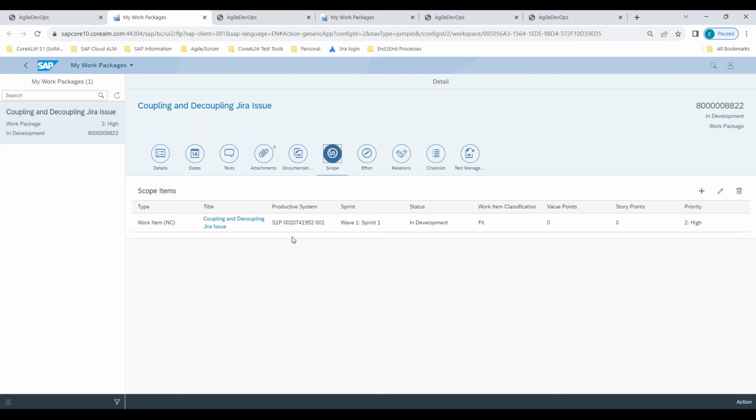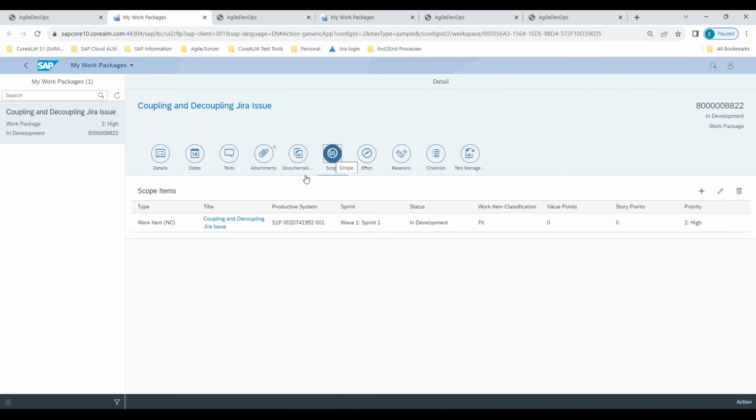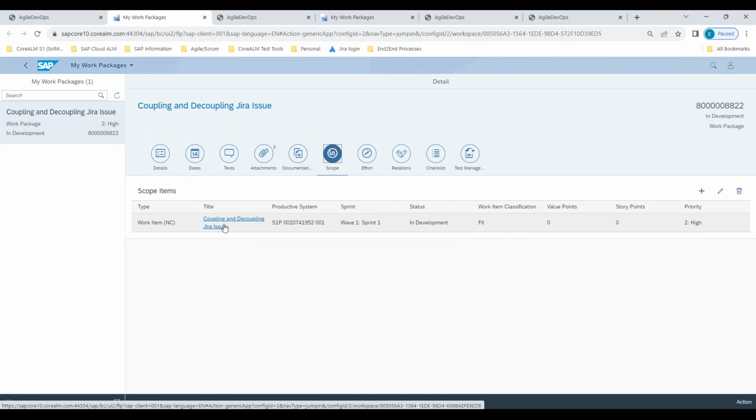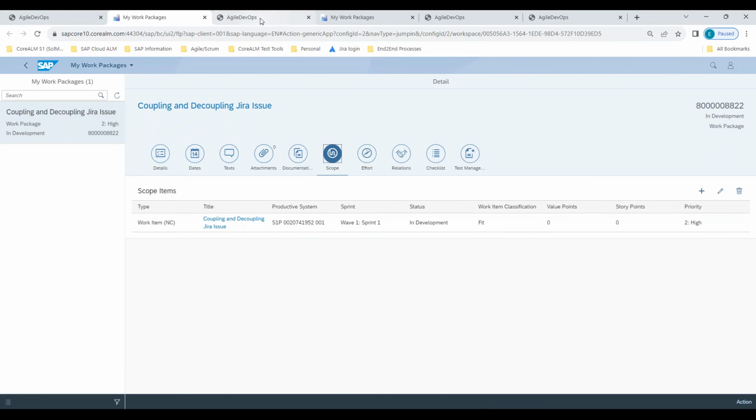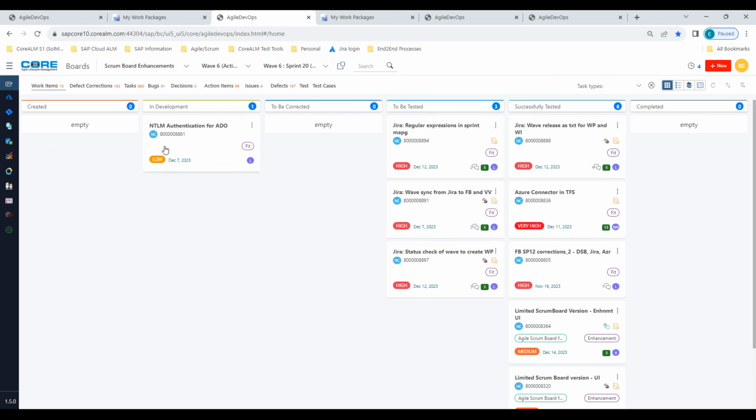Then you want to break down those requirements, based on those deliverables, at a more granular level. And this is where you would actually start breaking those down at a work item level. So let's say we have FSDs, development work that needs to happen, or even functional unit testing. This is where we start planning those at a more granular level, at a sprint level. So from the work packages, we've created work items, and then these work items, if I go over into my next screen, will flow into the Scrum board in itself.